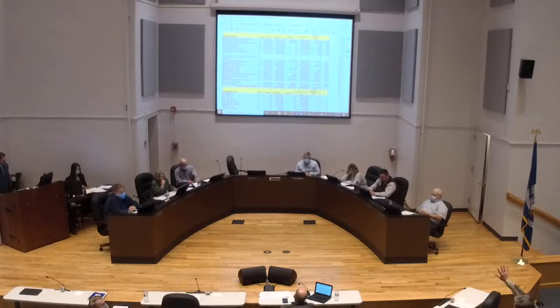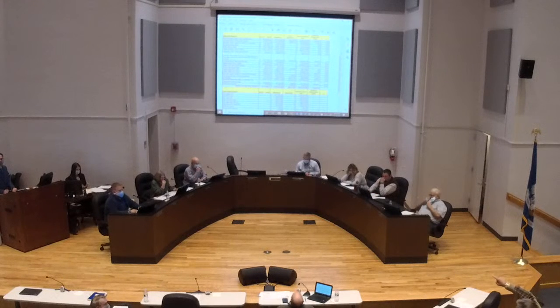Those funds are all just finished, they're sitting there. So you could choose to take as much money as you want from any one of those projects. You could take all those monies and put them into a general line item, miscellaneous, that we had in phase 1 projects. Not assign any project. That's as you wish. But those numbers are based on the original budgets approved by the board. So if you want to make any motion, I think that's how you want to go about it. What money is from which project, so I know where to subtract those from.